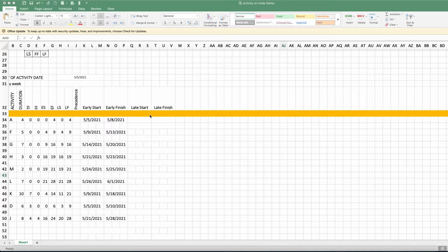So, next would be the late start. For the late start, it is the same formula, but this time we place it below, so we can distinguish our bar later. Okay, so late start is equivalent to the starting date plus the late start here. But let's not forget the dollar sign before the number, so we can have it fixed. So, copy. That's all. Paste.